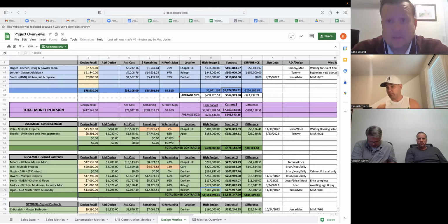Right. Because we've done that in the past where someone said they want something, we drew it and it was too expensive. And they're like, oh, let's just cut it out. So then we lost. They paid us nothing and we lose all the time and energy and money. So this allows us to reset expectations to at least, even if it's not perfect, it's close.